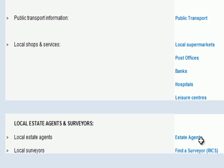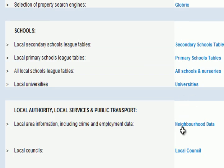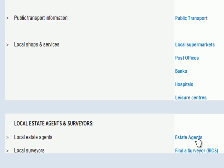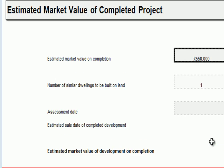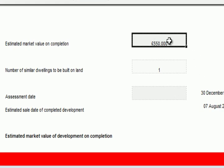We decided there were additional resources we could use in trying to arrive at market value. One approach was clicking here to look for local estate agents in the postcode area, then giving a couple of them a quick call, making contact, seeking their views on market conditions, and getting an idea of how much a four bedroom house could be worth. We then updated the model and entered a value for the completed four bedroom house.